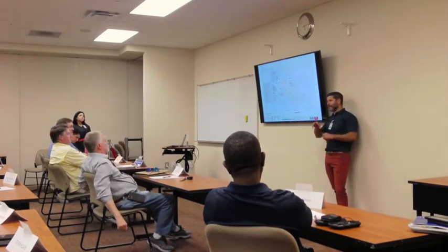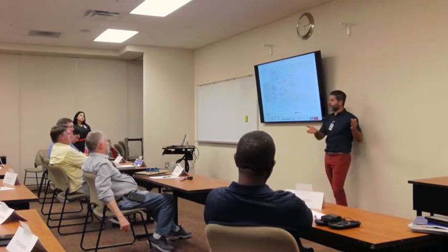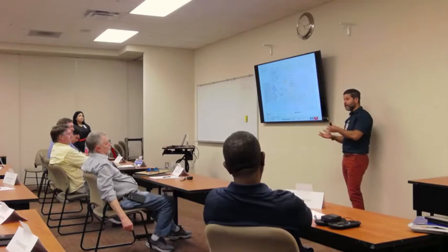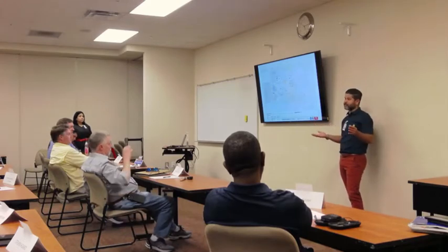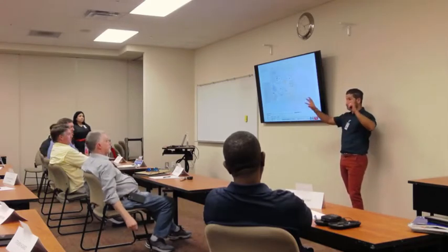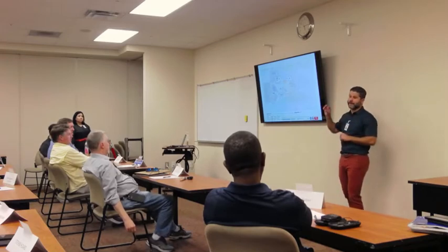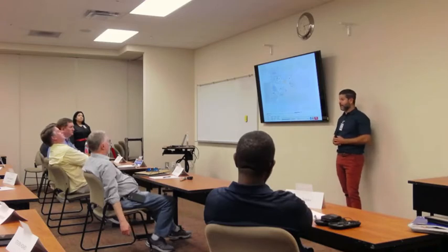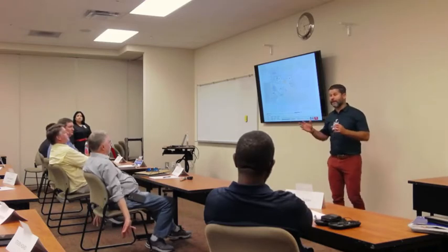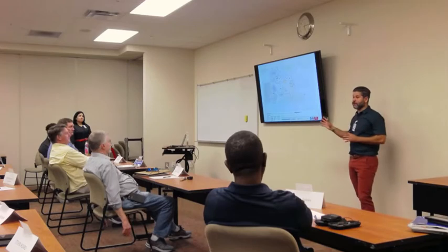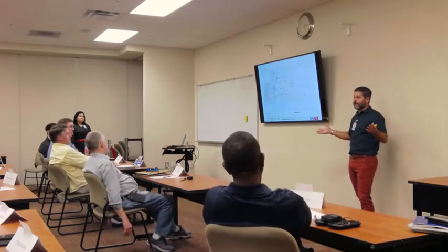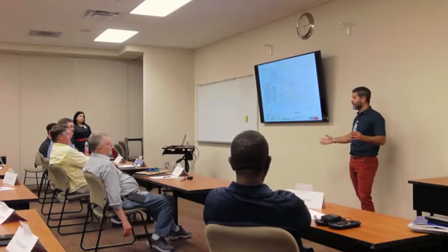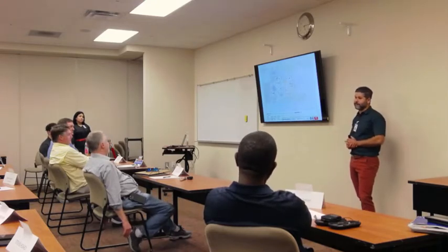And the other challenge that we have when it comes to service is that the district lost their food vendor. And now they are struggling to find another food vendor that is a full service thing. So right now what the district is doing is grabbing parts and pieces, so they never know when they're gonna get an 18-wheeler or a box truck or whatever it may be. So we gotta make this as flexible as possible, because before we used to be able to know all you're gonna get is a 20-foot truck and that's it. But now in this case, we might end up with a full set line coming through.